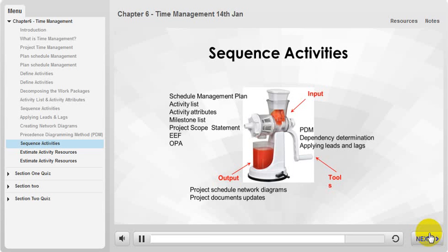What could be an example of a logical mandatory relationship? The water must first boil before the coffee can be made, whereas a discretionary relationship example would be that the user guide and quick start guide documents are both required, but the sequence of creation is not important. But I choose to create the user guide first because it is a larger document. Hopefully you understand the concepts clearly.